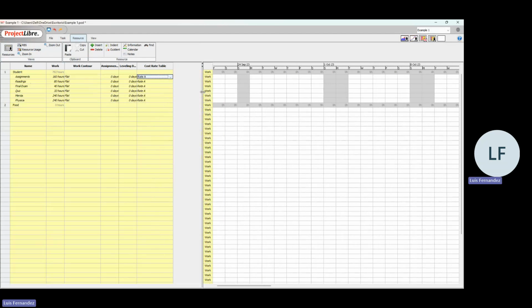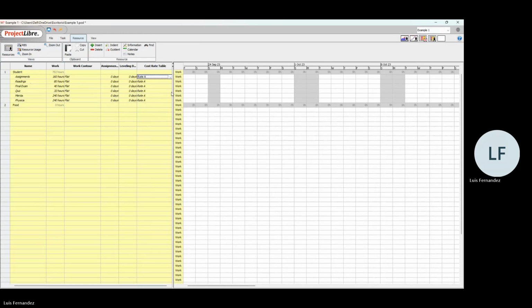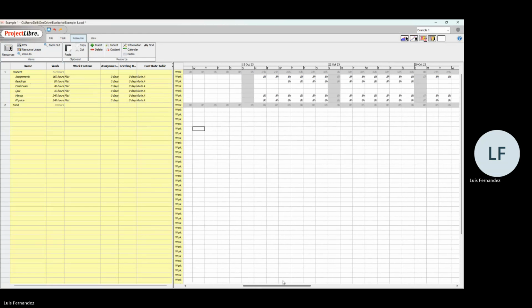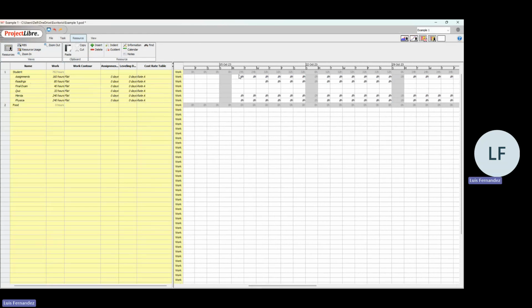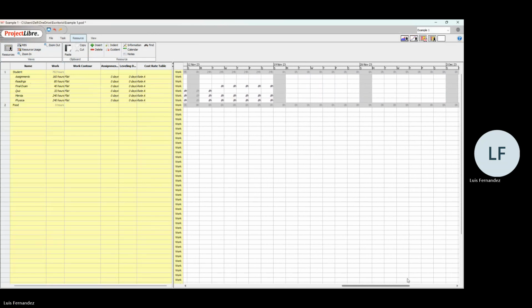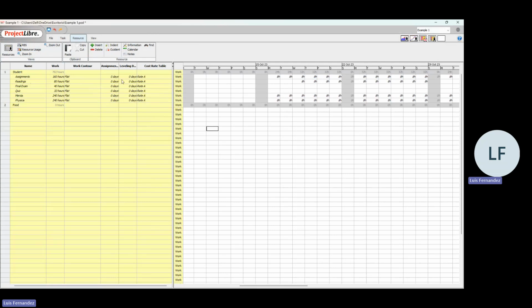And the rates, cost per table. And let's go and find the usage, because it's one resource for all the activities we planned. This resource is working 24 hours without sleeping, and maybe 32 hours, so that is impossible. But if you modify it, nothing changes because you have only one resource. So that's why usually it is flat. We have different rates. Everything is at rate A.